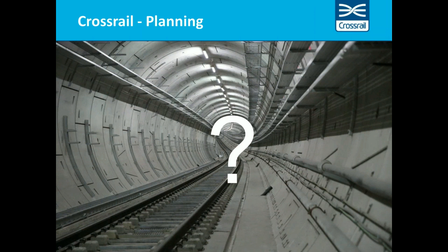We realize that quite often we are not aligned with our contractors, and a lot of that can be driven from contractual or commercial issues which Crossrail and the contractors need to sit down and work through, because without that alignment on the contractual and commercial side, we will not have a fully joined up schedule which the contractor is fully aligned with. So yes, the answer to the question is we spend an awful lot of time interrogating those schedules and trying to understand what's driving them. If it's purely construction-related activities, then that's fine. We'll look at that, and we're constantly re-engineering schedules and replanning if obstacles come along and we realize that we cannot build things that our original plan had intended.